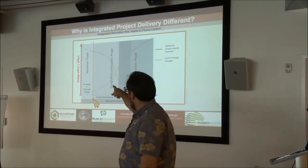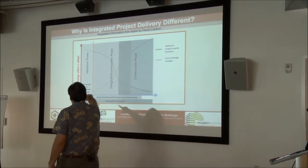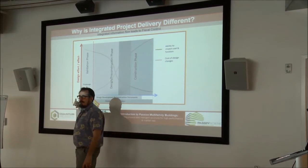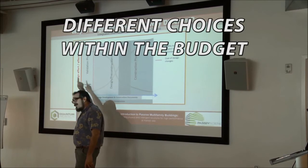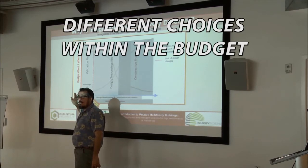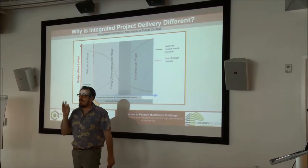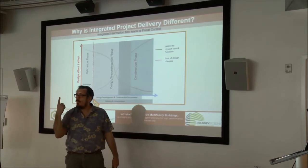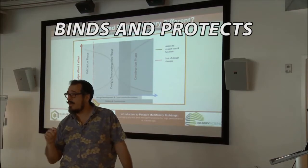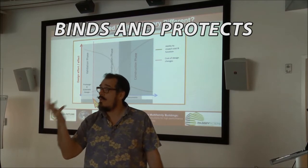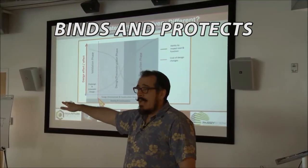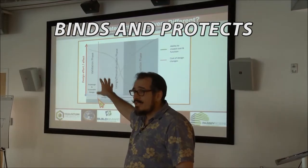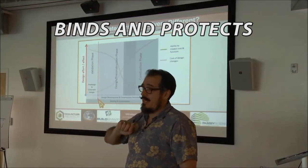For example, when I'm in the validation phase, I might be considering three different structural systems. Do I need to know which one is going to work into the final design? No. But I've got to know that within the different choices I have, I can work within this budget. The cool thing about a relational contract is it's one contract that binds all the parties — architects, engineers, owners, major subs. They pool their profit, and the project's objectives and their profitability are all tied together.